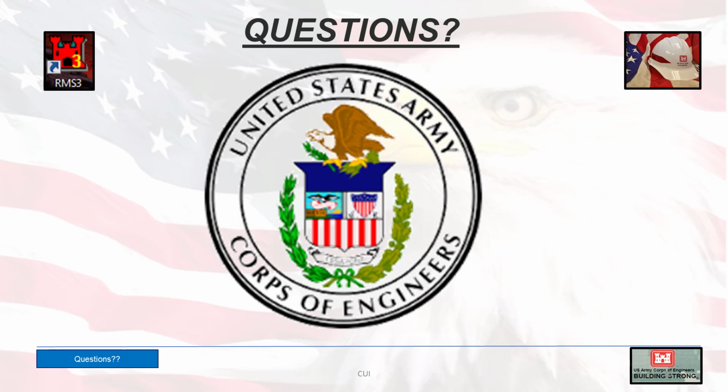And if this doesn't answer your questions, then you'll probably have to reach out to CEFMS themselves in order to get an answer. As long as there is one signature on the ENG 93 before it is sent to CEFMS, it should be okay, because I've heard a lot of districts that have the ACO sign in, or someone else signs in CEFMS, not inside RMS.